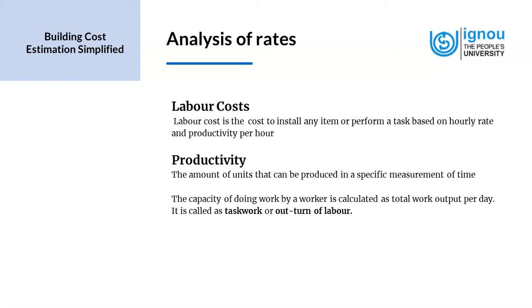Now, while we have different personnel working on a project, both at the project site as well as people working in the main office far from the project site, when we refer to labor cost, we are actually referring to the actual manpower on the job site. The other people, sitting in the office, who also contribute to the project, are accounted for under overhead costs, and so this has to be borne in mind while preparing an estimate.